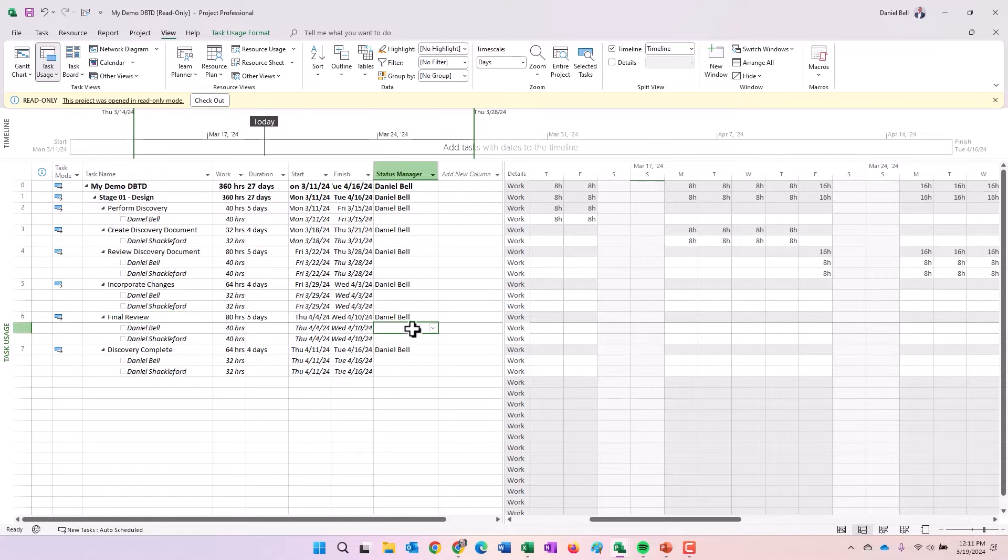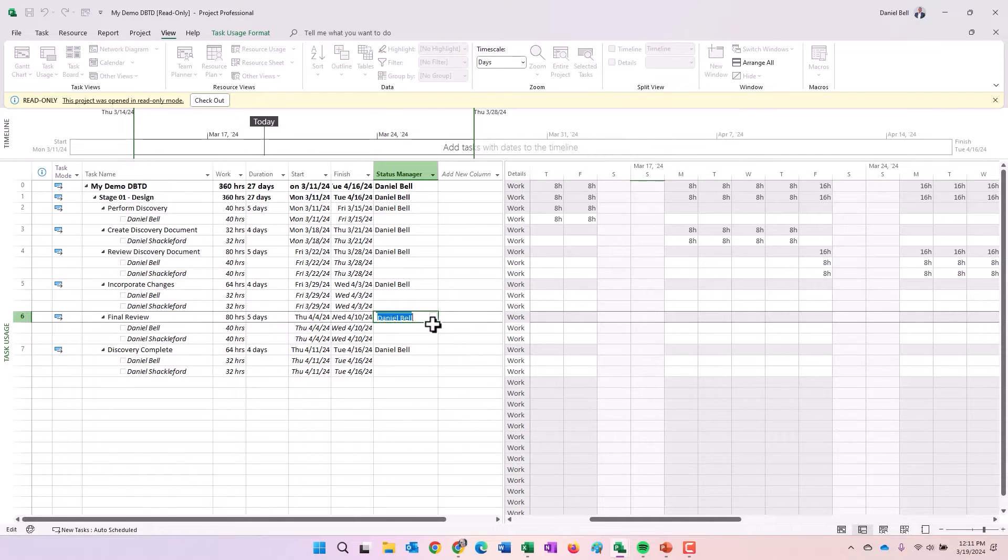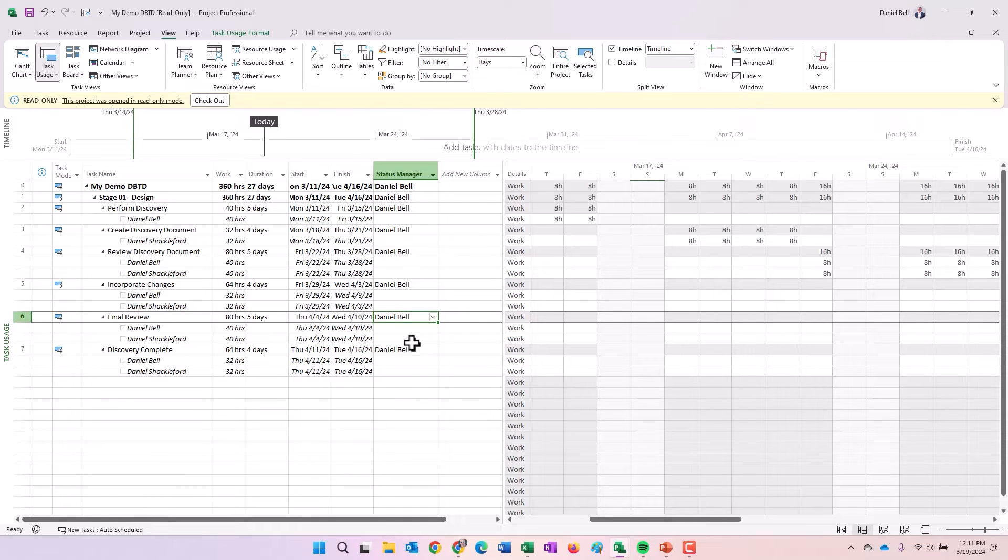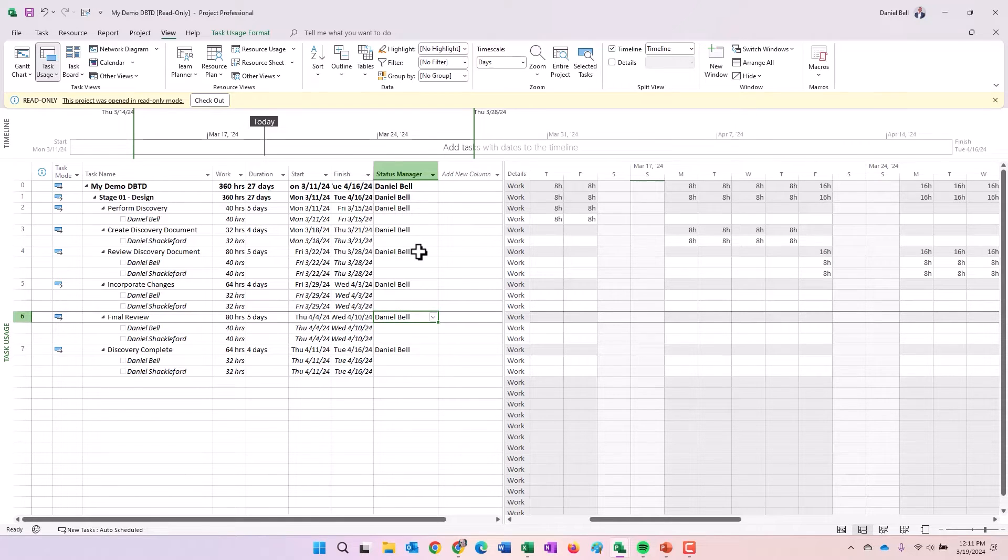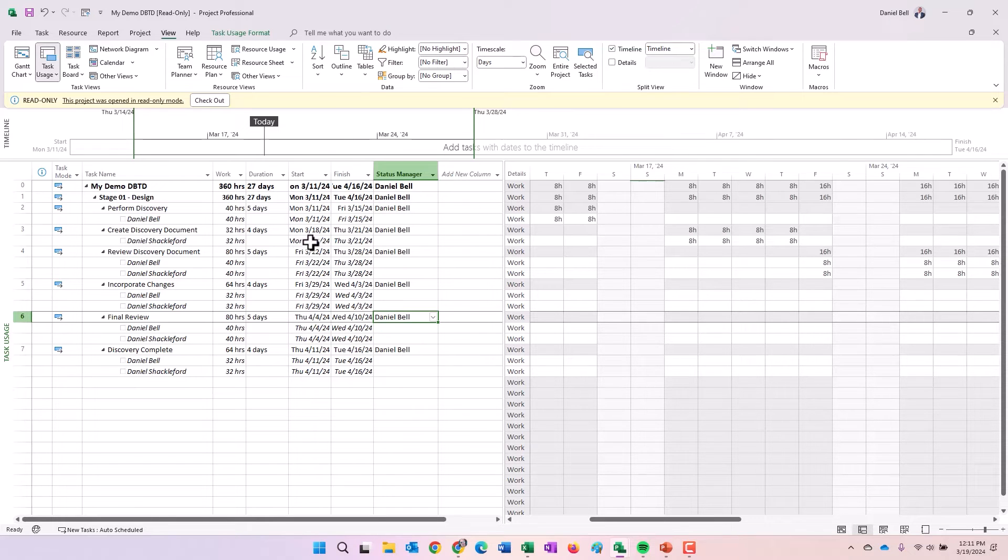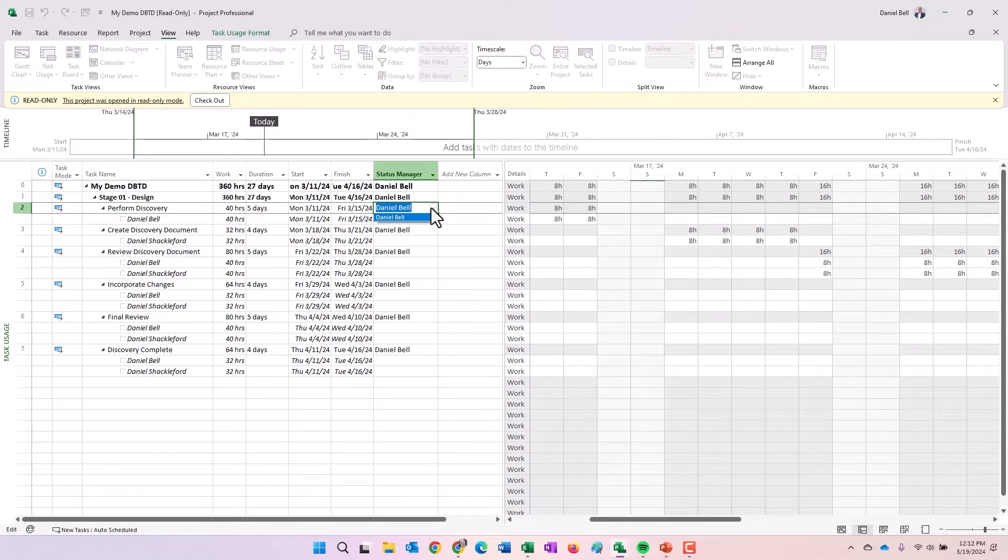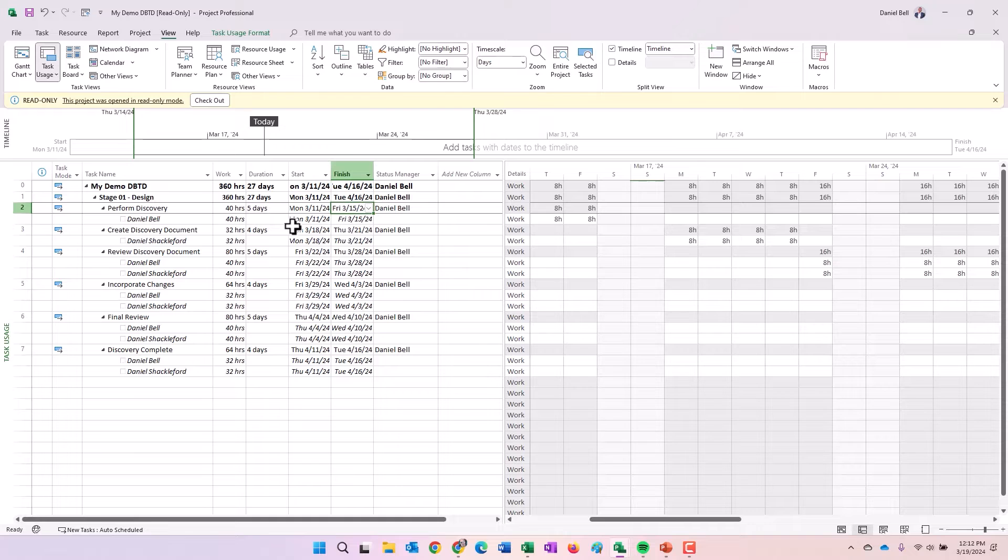If you wanted to change who the status manager was for a specific task, that person would open the project up, change who the item is or the status manager is here, then save and publish the project. But remember that person who wants to be the status manager would have to open up the project to make the change because I am logged in and I am the owner. The only person available to me is me.